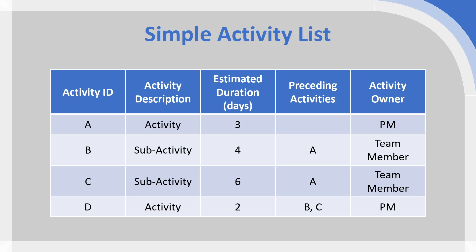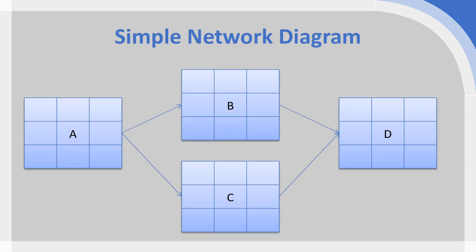The preceding activities allow us to create a simple network diagram. We start with activity A, then move on to B and C, which can be run in parallel, and then finish with activity D. We can see that we have squares around each of the activity codes, and we're going to fill these in with a range of numbers, which we'll look through one by one.